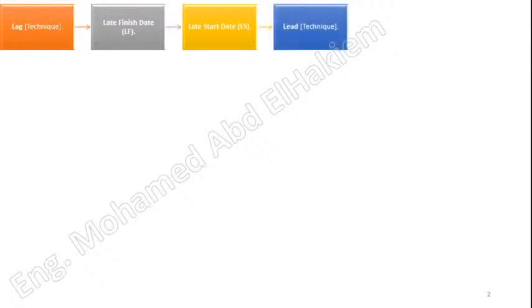Lead technique. A modification of a logical relationship that allows an acceleration of the successor activity. For example, in a finish-to-start dependency with a 10-day lead, the successor activity can start 10 days before the predecessor activity has finished. A negative lead is equivalent to a positive lag.